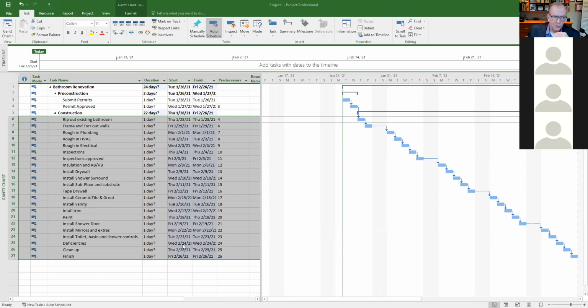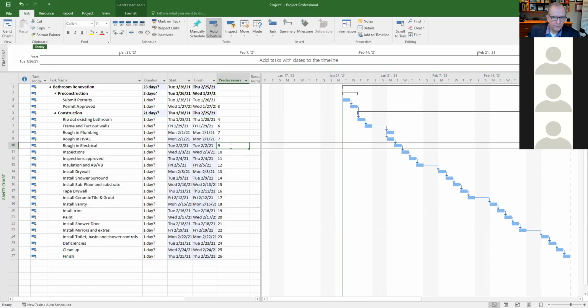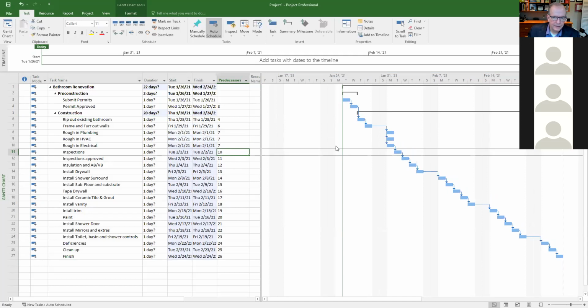So, you know, if I was doing something huge, like a 7, 8,000, 10,000 square foot house where the bathrooms are like most people's master bedrooms, well, yeah, then I could have stuff going at the same time. I could have, for example, the HVAC and perhaps the electrical happening at the same time.